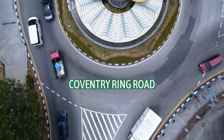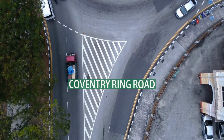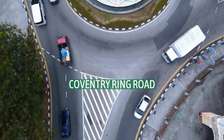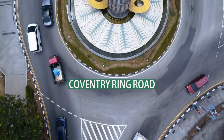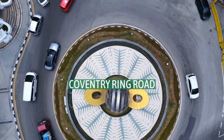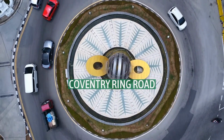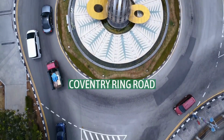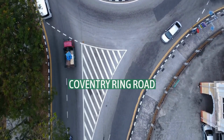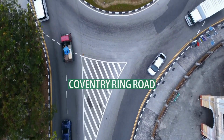Following traffic surveys in the early 1960s, however, the council amended the design to include grade separation and the weaving sections. Research by the city engineer indicated that it was the first urban road in the world to use this configuration at such a small scale. The road was completed in 1974, with an overall cost of £14.5 million. As one of the few British cities to see its Ring Road project to completion, Coventry has received attention as a source of research for post-war architecture.